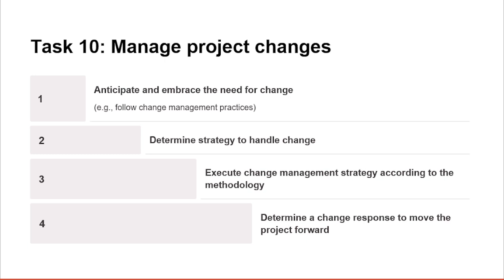You must also identify whether the change requires formal approval from the Change Control Board, or the CCB, or if it can be handled through adaptive or agile change practices. So it depends on the project methodology that you are running your project in and that you have to follow. And this will be our next topic.